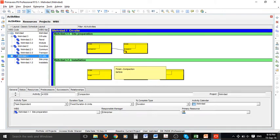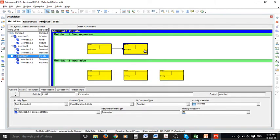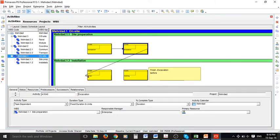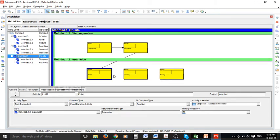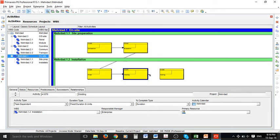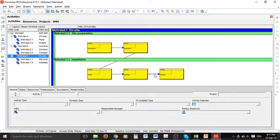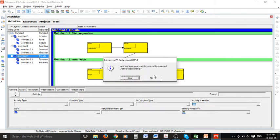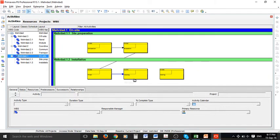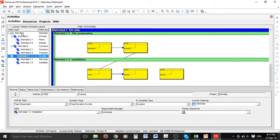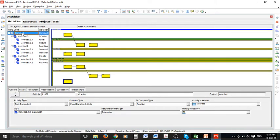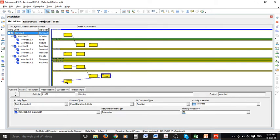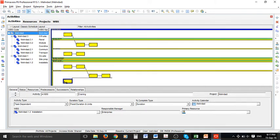The same thing for finish, it should be connected to other activities that I have. So these activities are not connected yet. I can hover my mouse and easily create the relationships between them. If you made a mistake in here you can easily click on the relationship and press delete to remove the relationship. It is very important to have a very closed network so all activities are connected. In here we are having these activities which are not connected and I will try to do that.